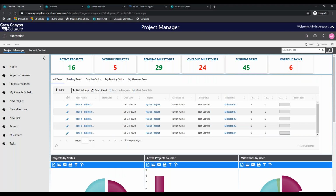And what's nice about that is, again, if we go back to our workflow tool, we can notify maybe the project manager that, hey, a task has been completed or a milestone's been completed. And not only can you notify that person when the task or milestone is completed, but you can also notify the task or milestone owner that one of those items is coming due. So if you want to notify someone to say, hey, look, this set of tasks is due at X time, and send that to them via email, you have that ability to do so. I like to say you can ping them as aggressively as you choose. I think it's as quick as every 15 minutes. Don't quote me on that, but you send these off again at a date and time cadence of your choosing on how frequently you want to ping that person and let them know tasks or milestones or projects are coming due.